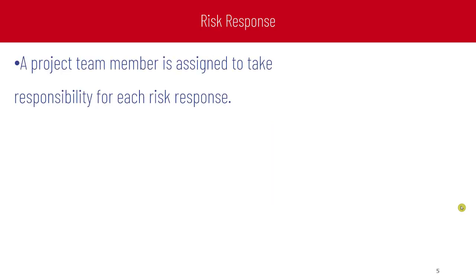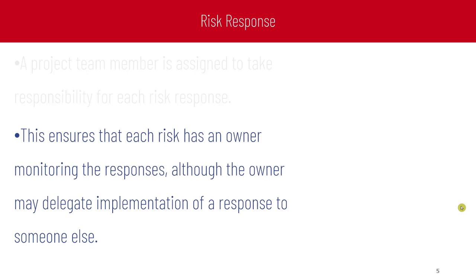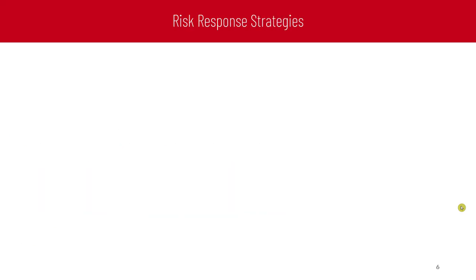A project team member is assigned to take responsibility for each risk response. This ensures that each risk has an owner monitoring the responses, although the risk owner may delegate implementation of a response to someone else, but still the risk owner is the one responsible for monitoring the responses.